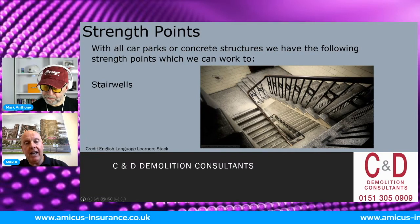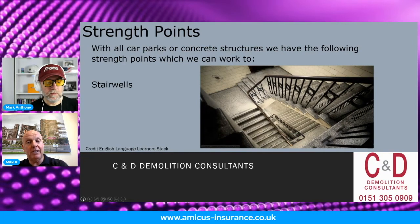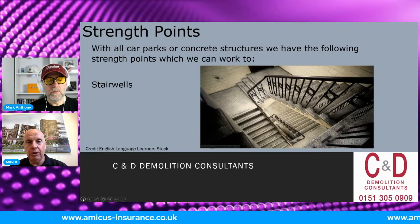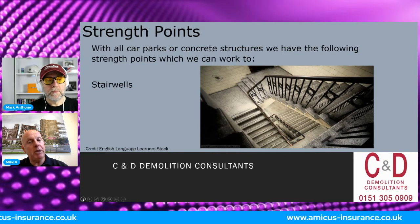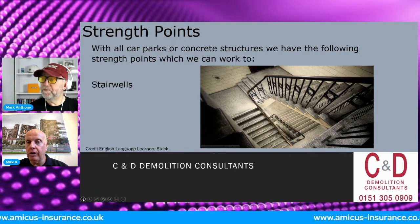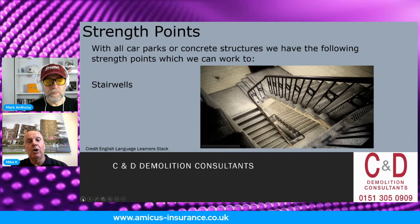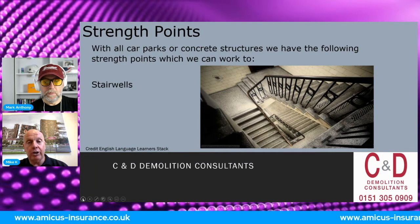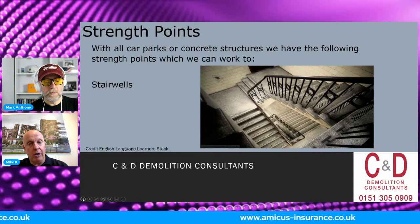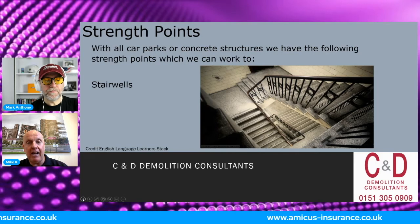How can we stop a failure hurting people, whether it be the demolition contractors or pedestrians walking past? Well, we can produce an exclusion zone. It's not hard to produce an exclusion zone. We can get it done fairly quickly. We can plan it, and there are enough demolition contractors out there with enough firepower. If you can bring a motorway bridge down in 18 hours, we can certainly get a car park on the floor within 48. So there are simple matters to do, but the client has to have an appetite, and somebody has to force that through, because we know they're failing and we know they're causing particular dangers to people, so we can eradicate it. A little bit of time, effort and planning will eradicate any failures.